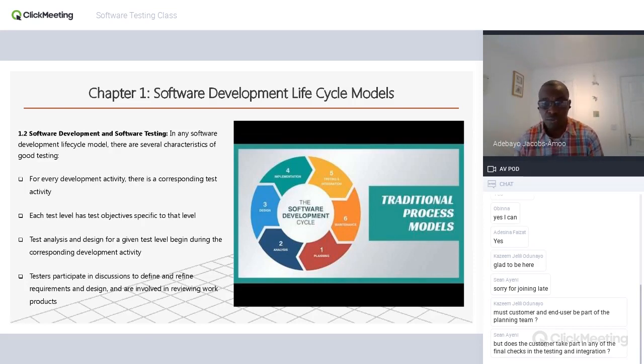Two months into the project, something catastrophic happens, and I lose 4 months. Do I still think I can go live within the time frame with 7 testers? Nah, it's not going to happen. So I need to go back to them and ask for more resources. So it's always an estimate. We don't know that.